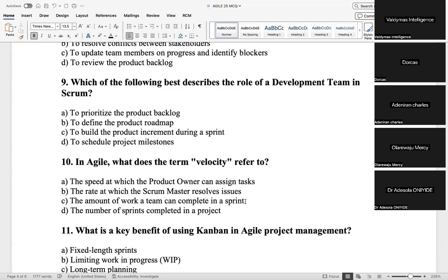So you will see us when the sprint is remaining 2 to 3 days to the end, you will start begging the PO to quickly do PO review and move the story to done. You will see me chatting them or pursuing them to please move all the stories to done. And on that last day of the sprint, every story that already has a QA approval, you can work with the business team together, UAT and PO approval that same day and get it moved to done. Do you get my point?